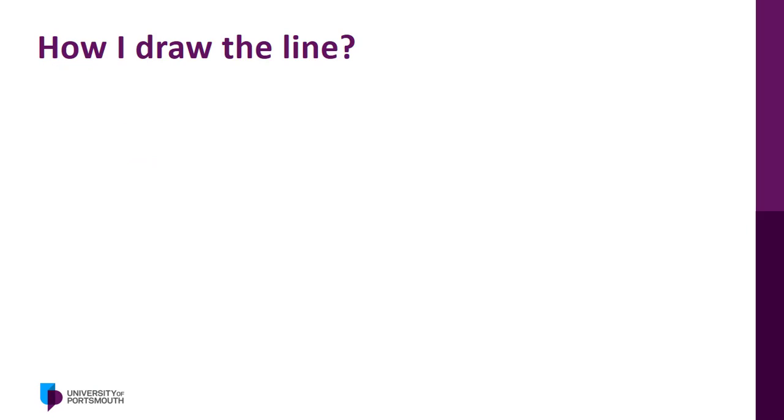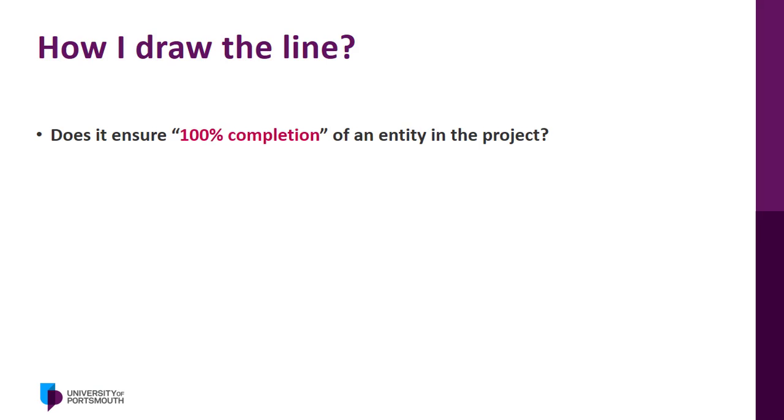No two projects will have exactly the same clusters. The division of the clusters is a matter of discussion and debate as to what is included in which cluster. A cluster contains all components that, when integrated together, complete a section of the building that can be signed off.